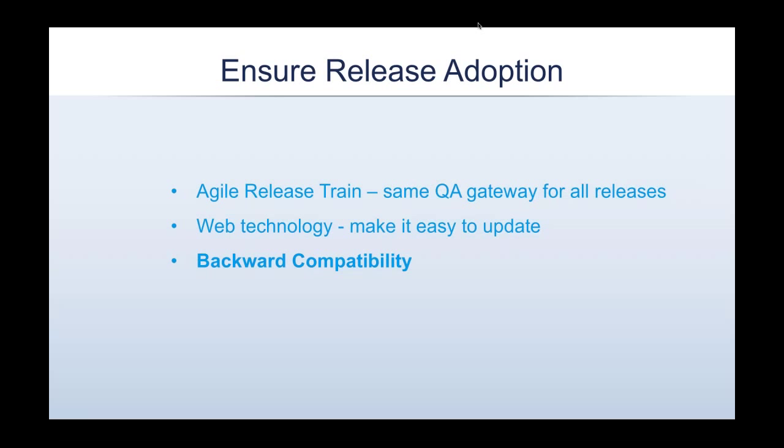So, for example, I was saying that we have 4 releases a year. In the service release, when a feature is being published, we ensure that we publish only those features that do not change the way people were trained to use the latest major release. If it changes the way, the users should be able to hide this functionality from the product. I think that release adoption is a very good way to measure the quality of your products.